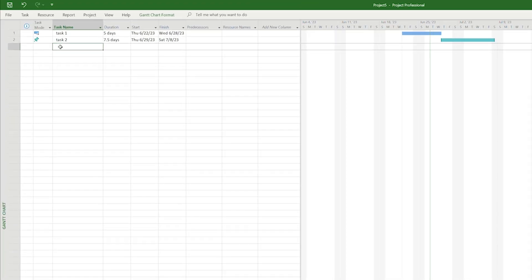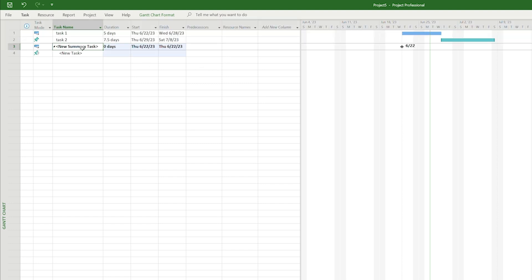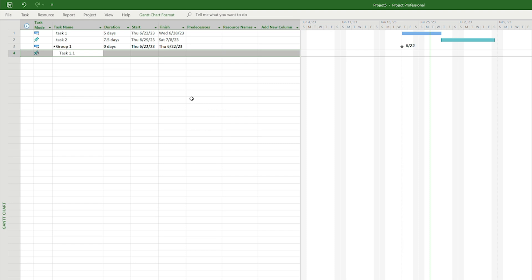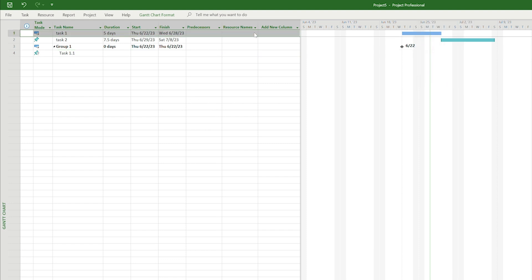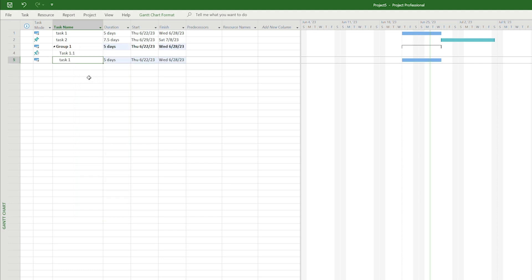Now that you have a few tasks created, it's important to start thinking about organizing your project tasks. Most projects happen in phases or are broken down into groups of similar work. You can use a summary task — a collapsible subgroup that helps keep your project organized. To create a summary task, select the task row, then from the task menu click Insert Summary Task. Give it a name, and Project will create the first task inside the summary for you. You can rename that task and move existing tasks into the summary by right-clicking the task name, selecting copy, then right-clicking under your summary task and selecting paste.